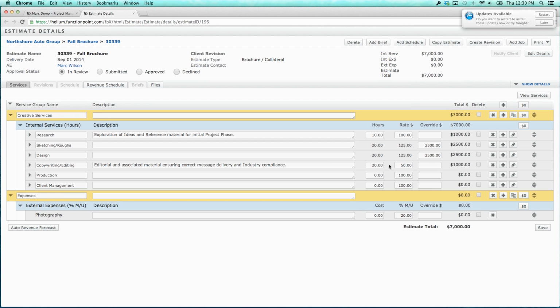I stalled saying that because the default way that the system works is looking to the admin section to see what rate applies for this timesheet. Look to the staff person's rates page and see if there is a rate, and if there isn't, use the standard rate. But if you want to be able to have the system look at this rate and use it for all timesheets, you can do that. Before I show you how, I want to mention that if you need to come down by $1,000, here's how I recommend doing it.